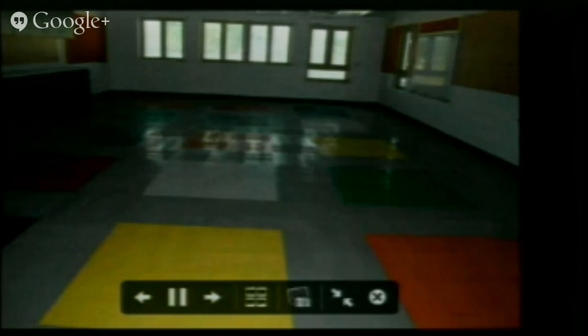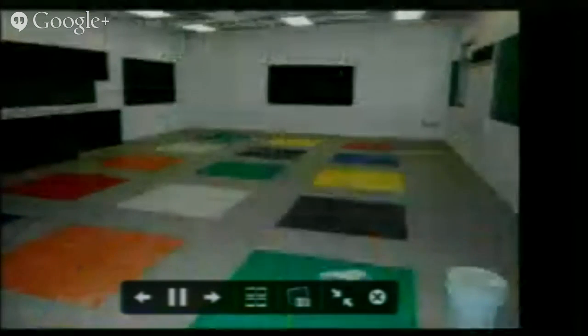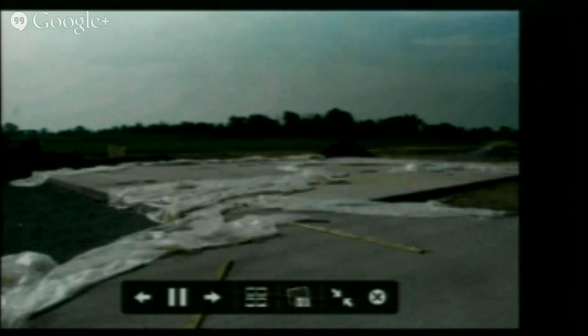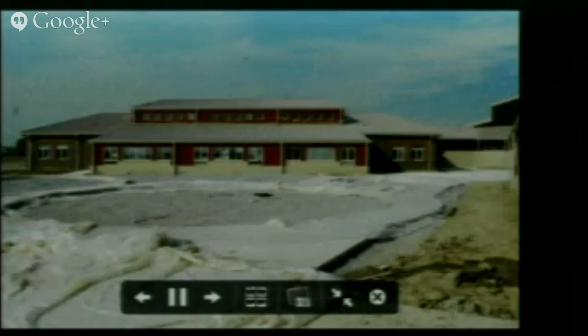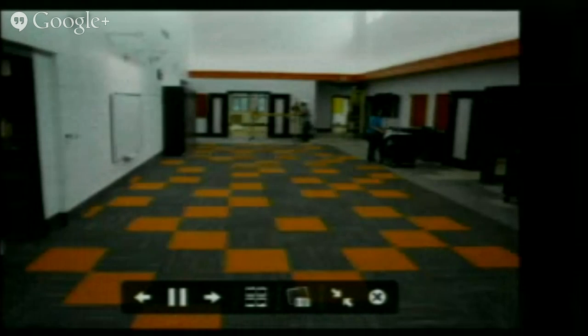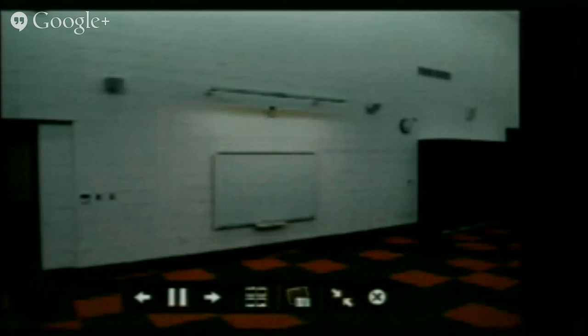We have finishes going on in particular in units A and B. They're pretty much done in those two units, your first and second grade and your kindergarten and pre-kindergarten areas. They have some of the smart boards to put up yet in the kindergarten, pre-kindergarten area, and they have pretty much everything done in Unit A. They have some glazing to put in on the windows for the classroom doors and glass, and then just a few cleanup, touch-up items. They're supposed to start punch list in those two areas on Monday, the 23rd.